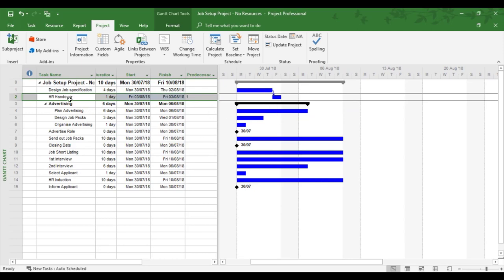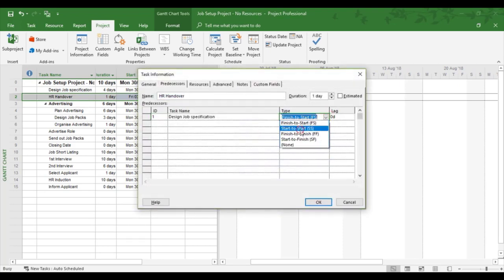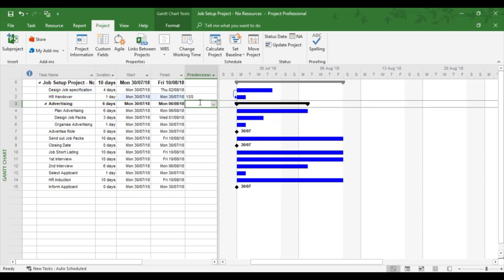If I change the link, so I'm going to double click, go to the next one, start to start. They now join together, and you can see a little line joining them together as a start to start link. What you'll also notice is in the predecessor column, it's an SS.